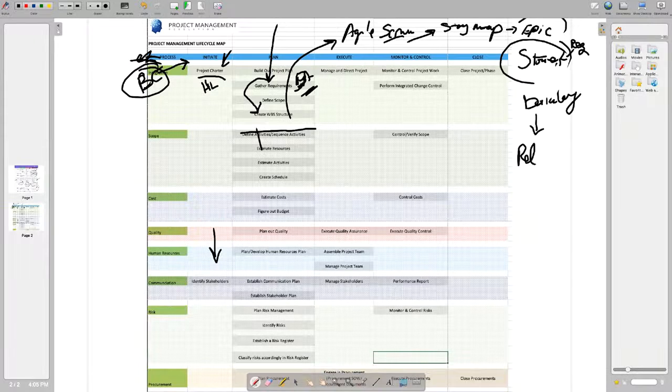And you're going to start doing a story point estimation where you assign a story point by using the Fibonacci sequence or card sorting or whichever method is best to be used on your project. Then eventually you formalize that into a release plan, and you get all your sprints lined up with all your features, or maybe possibly you don't have your whole release plan, but you've got planned-ahead sprints.